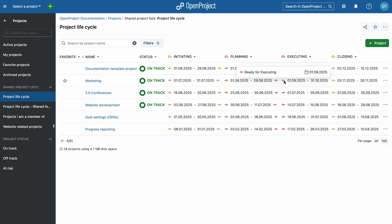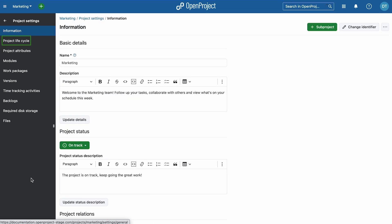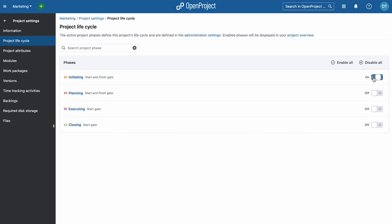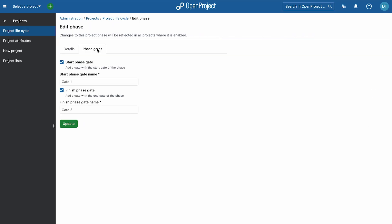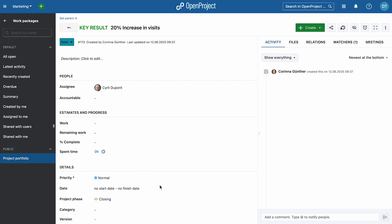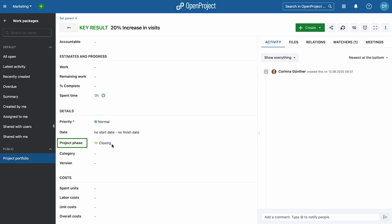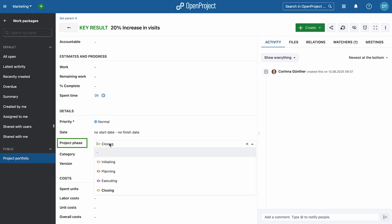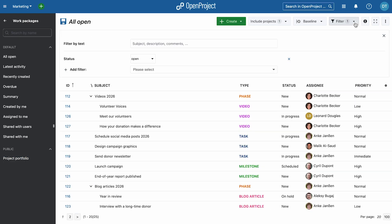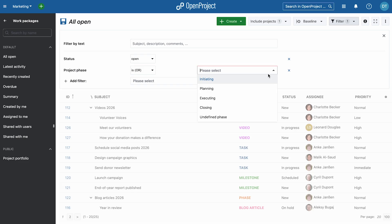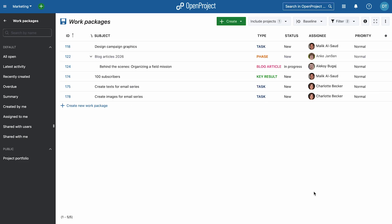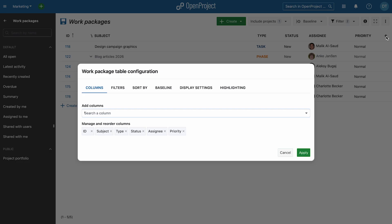To get started, go to Project Settings, Project Lifecycle, and enable phases. You can also define phase gates that must be completed before moving to the next phase. Work packages can be assigned to specific phases, helping you easily understand their context, filter by phase, and group them in table views.